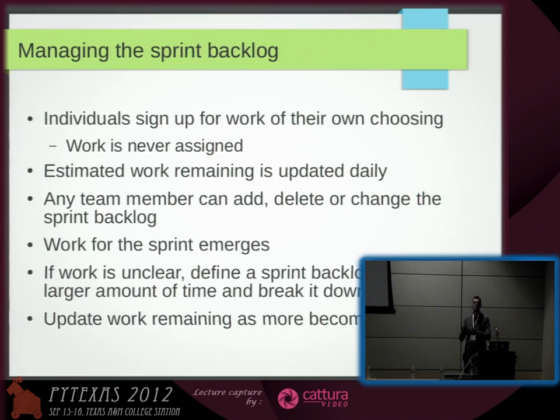And that means it goes back to the product backlog, but your assessment or estimate is not going to be, let's say, 10 days, or whatever. It's going to be, I need only 1 day. But you kind of remove that from this list of accepted things so that you have a very clean slate when you get into the next stage. So that's the ideal world. Unfortunately, we never live in an ideal world.